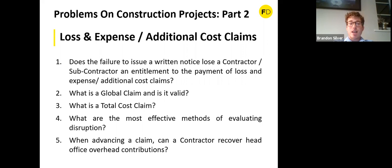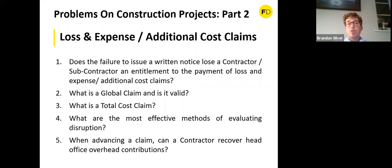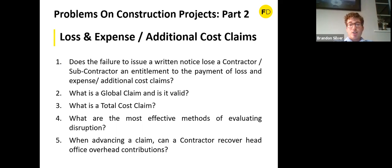The JCT contract does not apply condition precedent treatment to written notices, but the NEC form of contract does. So if employers want a clause in the contract providing that failure to give written notice bars entitlement to loss and expense, they should look at the NEC form.